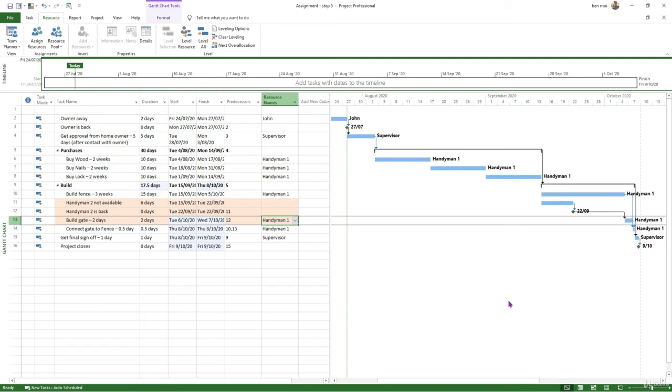The second challenge is when you have a schedule that is across 4 or 5 pages, sometimes you have the need to overallocate, quote-unquote, a resource. You know that this resource needs to do a little bit of work here, a little bit of work there, and you want to keep it this way without changing the schedule, because you know that the resource has the capacity, they can do it, but you just need it to have this to make sure that they remember to do the task. So if you start resource leveling this, that would mess up your schedule, that would move everything to the right when it doesn't really need to be.